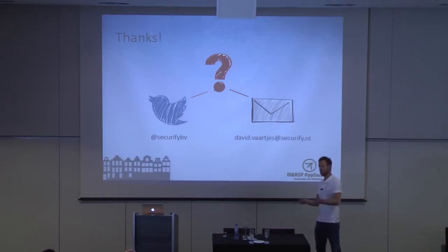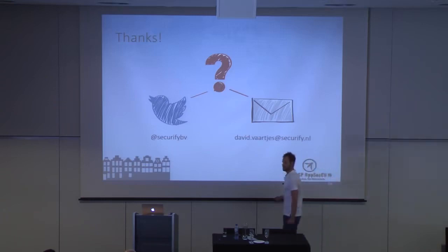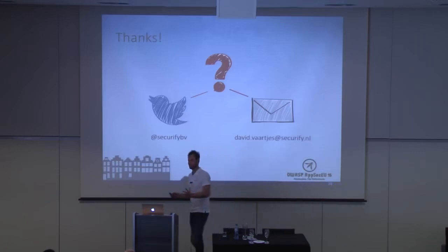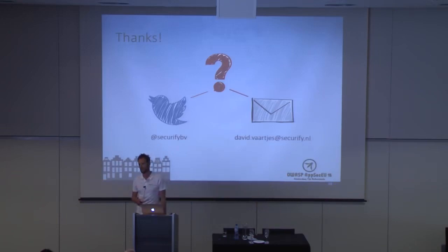So if you shift between teams and put in effort of 4, 6, or 8 hours, depending on what they're working on, you should be able to cover them. Maybe just start easy. Start with 5 teams, and try to find your way up to supporting more teams. So, yeah, 50 teams, 5 guys, so 1 on 10, I think.